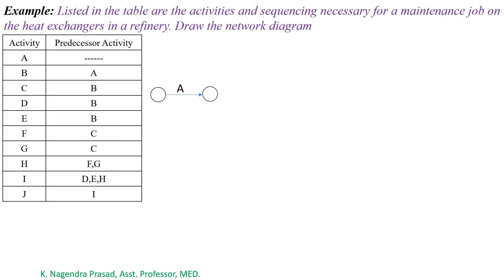Next, observe activity B. For activity B, A is the predecessor activity. So B will start after completion of A. Let's draw activity B.